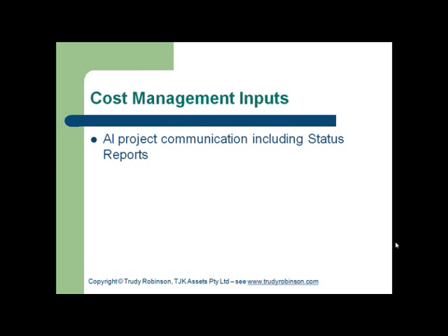Considering cost management inputs, obviously all project communication, including status reports, have information relating to payments, budgets, etc. Scope and contract variations would also include recognition of budget and any cost requirements. But the one document that's often used as a point of authorization that takes somebody at the coalface, so to speak, somebody who's actually doing the work or managing a team and providing the feedback back to the project manager that work has been done of a satisfactory standard and is now authorized for payment, is the use of a payment authorization.